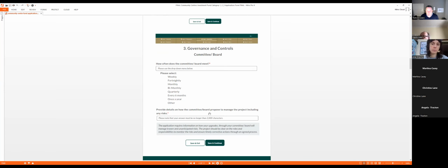Right, this is where you're back to project management now, okay? So please provide details on how the committee or board is going to manage the project, including any risks. Okay, so that's where you put in about your project teams. You're forming a project team or project management team to oversee the project. If it's a building project, which in this case most of them will be, there'll be building works involved, there'll be structural works involved. On that project team, you would have either an architect or engineer that's contracted who will oversee the building works. Okay, so they're going to be employed or contracted by you to be the supervisor on the project and would sign off on all the works done on the project.